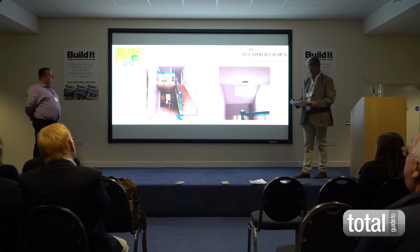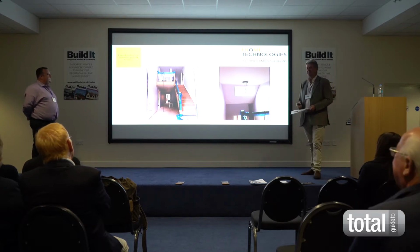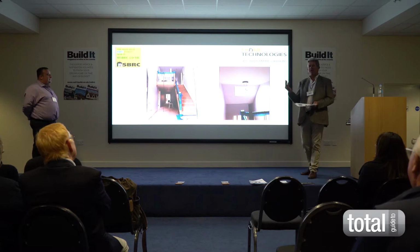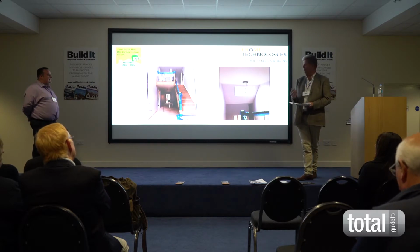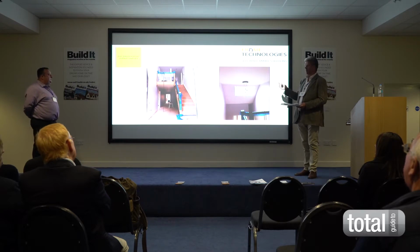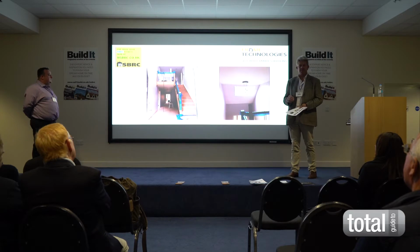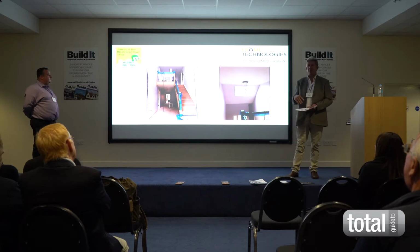Yeah, I ordered the wrong one. I got the width and the height the wrong way around. But again, this is where having it under one remit, the original architect drew it all up. I said to Martin, that window's never going to fit. Yes, it'll fit, yes, it'll fit. I said, it won't fit. Don't order that window until we've run the timber frame design.